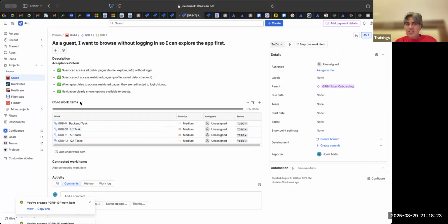It should be realistic. This is a realistic story. It is a proper functionality. You are implementing guest login. It's a proper story. So make sure whatever you choose as a two pointer baseline has a simple UI and a backend task. That is a rookie mistake which a lot of people make who do not have experience in Agile. They will choose just a one pointer with a very simple UI task.